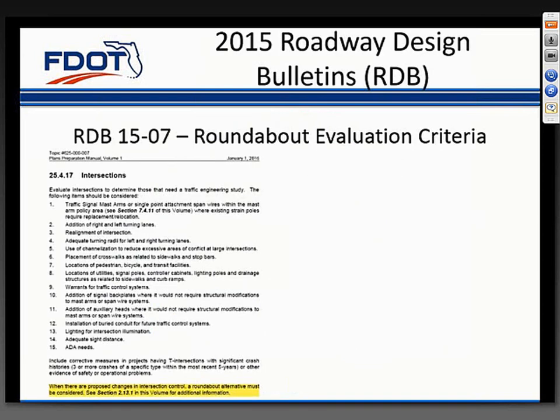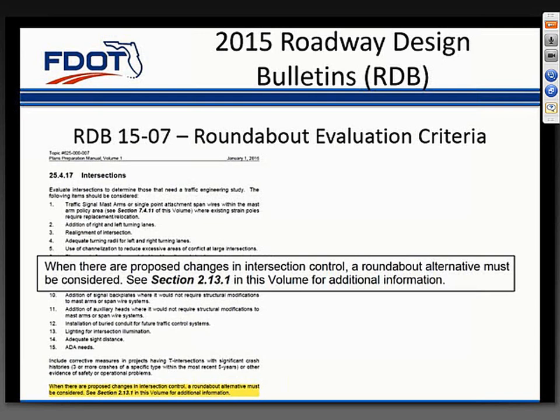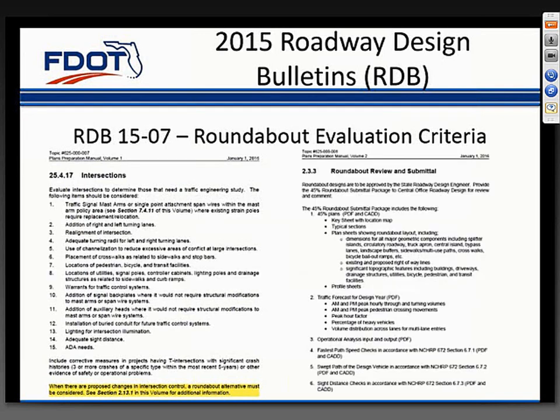Roadway Design Bulletin 1507 established a process to satisfy the roundabout evaluation requirement. This can be found in a couple of locations within the PPM. In Chapter 25 of Volume 1, the 3R chapter, Section 25.4.17 states that when you have proposed changes in intersection control, you'll have to consider a roundabout alternative. This is discussed in more detail in Chapter 2 of Volume 2. Section 2.3.3 of Volume 2 identifies the items to include in your roundabout submittal package. This is called a 45% submittal package because it needs to occur between 30% and 60% plans—it's not an additional full plan submittal, but comparable to turning in a typical section package.